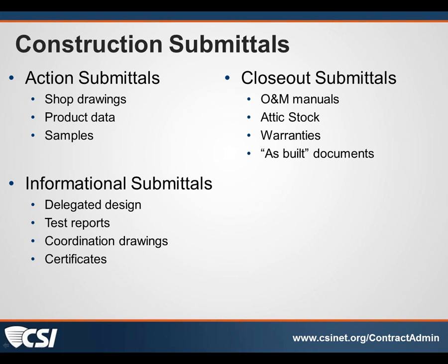Stephen Kendrick comments that in California, delegated design work for DSA, the state architect, does require action by the design team. So for DSA projects, delegated designs fall under action submittals.